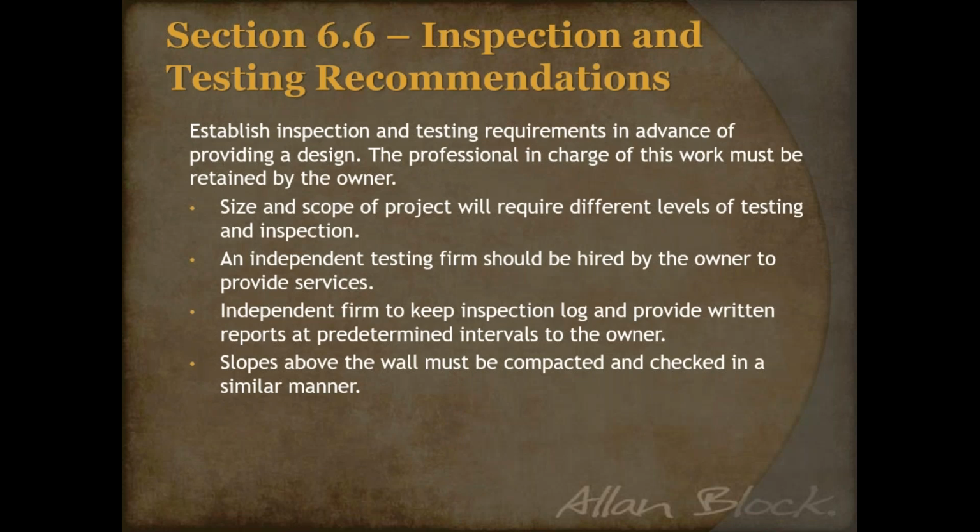6.6 for best practices. This gets into establishing the testing requirements. Again, coming back to the size and scope of the project, residential versus commercial, DOT, Ministry of Transportation versus a small little garden wall. We want to make sure we're putting in the right type of testing requirements. And one of the biggest points we have under 6.6 is we want independent testing being done, but we would love that to be done and paid for by the owner or the client. Ultimately, they're paying the bill anyway, whether the contractor is securing it or the owner is directly. But we like defining those roles and responsibilities.